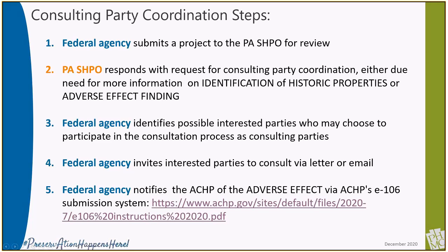If your community has a local historic preservation organization, you should contact them. If they do not, you might reach out to the county historic preservation or historical society office. You can always ask the SHPO for guidance if you are wondering just who would be the appropriate consulting parties to invite to a consulting party meeting. Sometimes organizations you might not think of could be appropriate, such as the Lincoln Highway organization, or others who are interested in travel and tourism, if your project happens to be